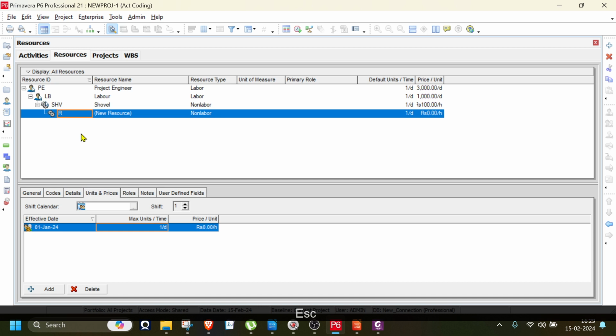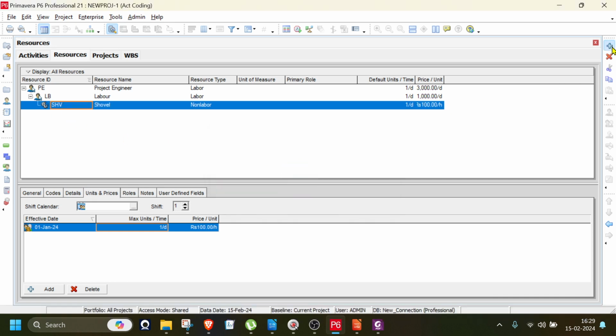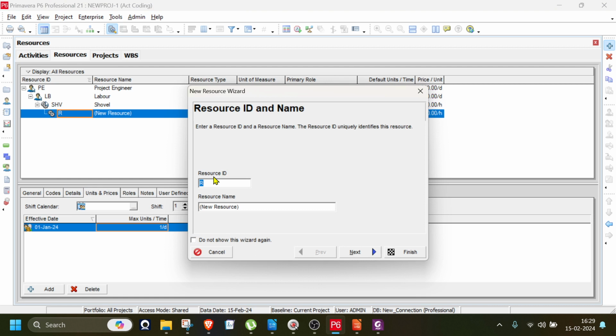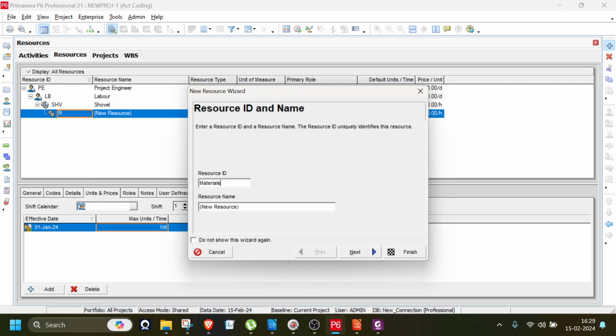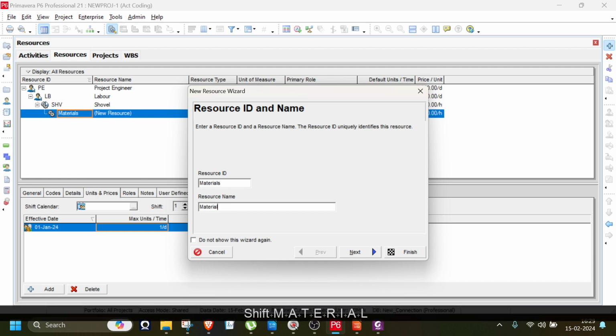Now here, default and maximum units, don't bother. Why? Because if I want to floor this room with 1000 tiles, I'll just put only 1000 tiles. Will I multiply it with the number of days? No. We add only the current quantity. So forget about the default unit and the maximum unit, because we add only the quantity that is required to complete the task.